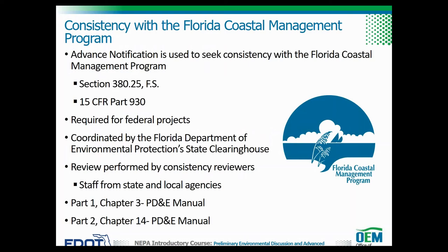Let's discuss the role of the Federal Consistency Review within the AN. The AN is used to seek consistency with the Florida Coastal Management Program, which is required by Section 380.25 of the Florida Statutes and 15 Code of Federal Regulations, Part 930. A consistency review is required for federal projects and is coordinated by the Florida Department of Environmental Protection's State Clearinghouse.